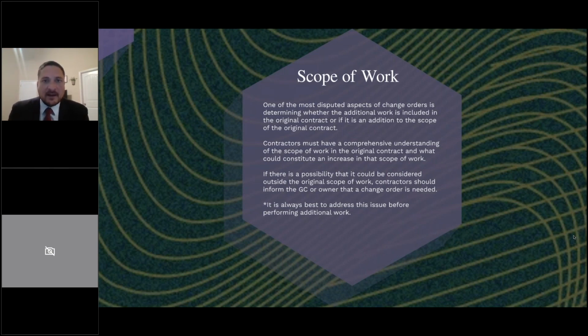what's in the contract. So you always want to have a sound understanding of what you're agreeing to and what you're not agreeing to, because that's going to determine what is a change order and what is not a change order going forward. So again, before you sign that contract, make sure you go over it with your staff, and make sure you have a good understanding of it.